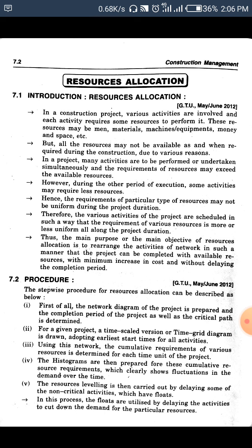but all the resources may not be available as and when required during the construction, due to various reasons. So in a project many activities are undertaken simultaneously, so the requirement of the resource may exceed the available resource, which is less. So at that time the requirement of a particular type of resource may not be uniform during the whole project duration.